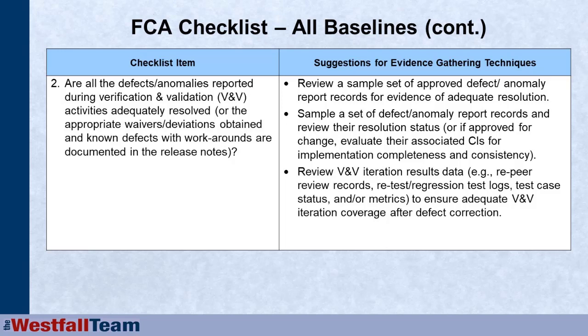We can also sample that same set of defect or anomaly reports and review their resolution status. If they got approved, then we can go actually sample the configuration items and make sure that that defect was actually fixed. And we can review the actual V&V results.